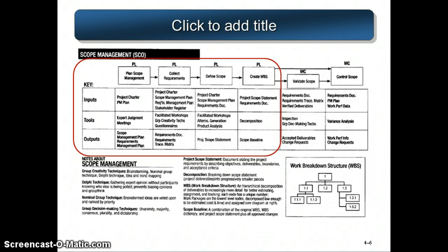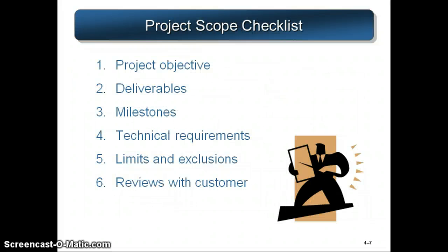From there, we move on to creating the work breakdown structure, or WBS. Now, we'll talk about that a little bit further later in the presentation, but this is where the deliverables are developed and broken down into sub-deliverables using a technique called decomposition.